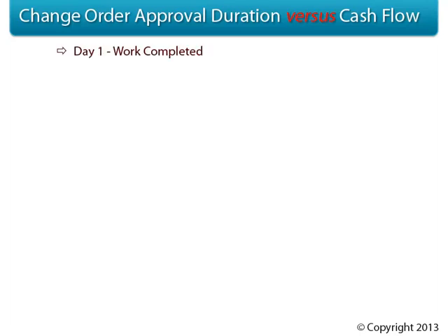Day 1, the work is completed. And we'll keep it simple and figure that this extra work is something that was completed in just one day. By the time the foreman gets their field tags to the project manager, and then the project manager has a chance to collect the pricing from material suppliers and equipment rentals, and then put it all on paper and mail it to the general contractor, we're usually looking at a couple weeks, even with the diligent project manager.